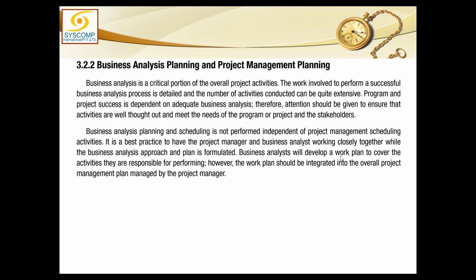The business analyst will develop a work plan to cover the activities that they are responsible for performing. However, the work plan should be integrated into the overall project management plan managed by the project manager. It does not mean that the business analyst is creating or developing the project schedule. Not at all. He is creating his own business analysis activity schedule.